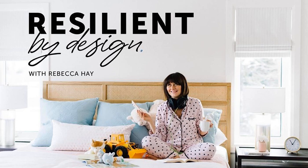Having a clearly defined process and separation. So ours is in phases, right? We've got the consultation phase, design phase, and then implementation. It's very clear. So when we get to implementation, we can just focus. We're not focusing on reselecting a light fixture. We're not focusing on which cabinet hardware we should use for the kitchen.